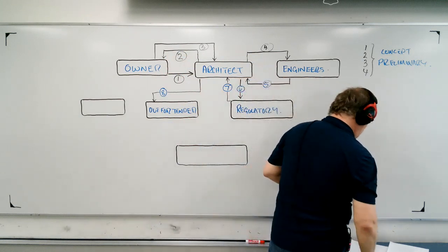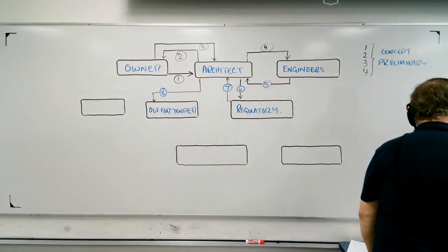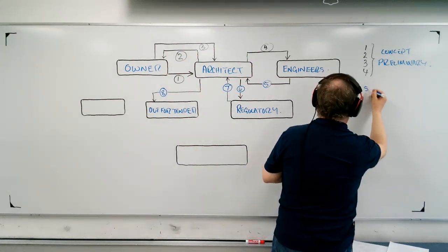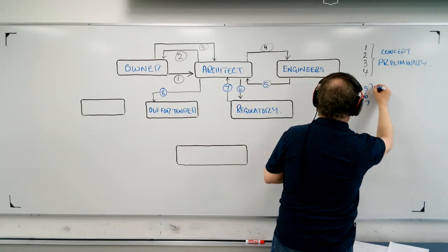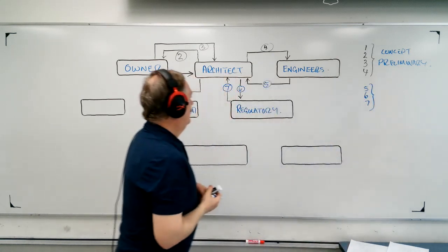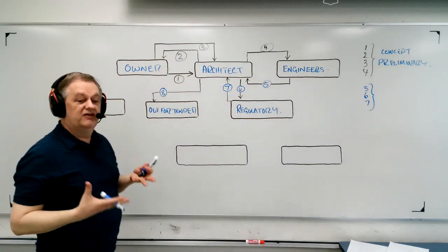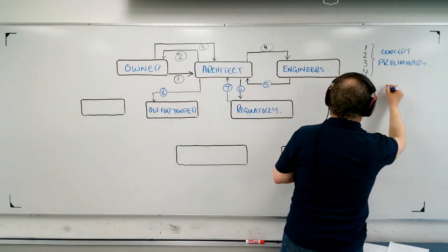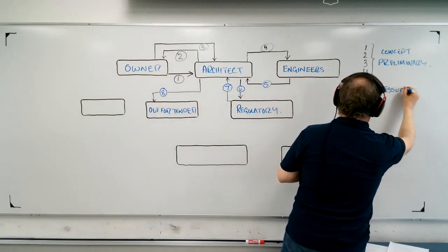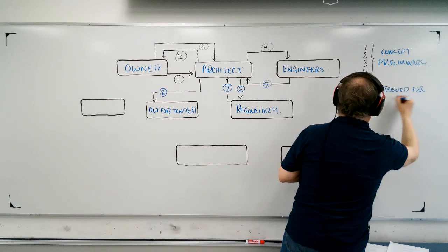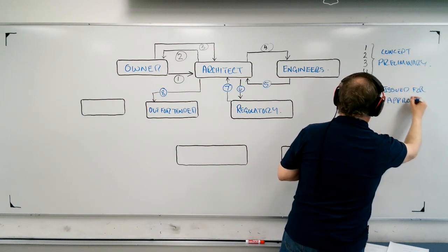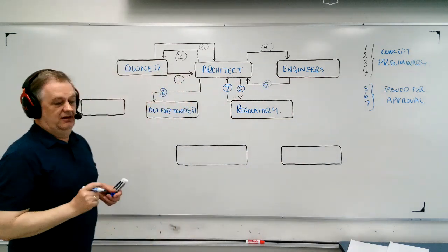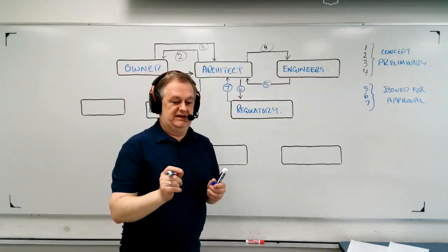Now, in the next steps, we had steps 5, 6, and 7. And 5, 6, and 7, they were actually called, what the plans are called during this time is issued for approval. And that's usually written right on. It's one of the revisions right on the plans. It'll be stated that they're issued for approval and what the date is.